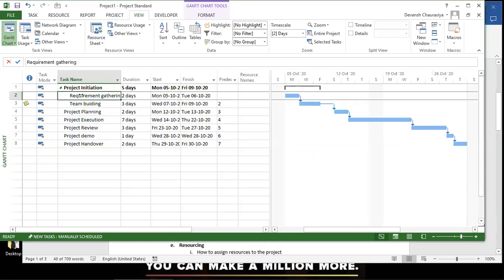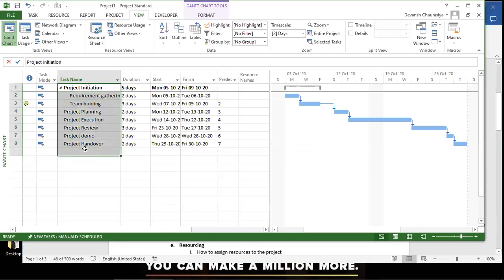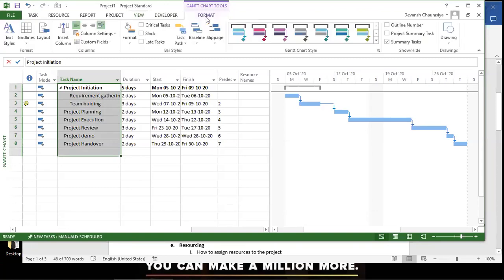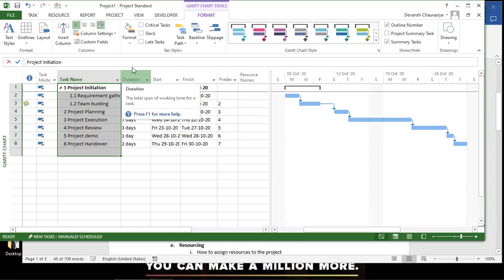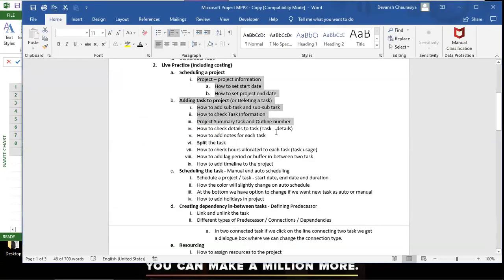With Outline Numbers enabled, instead of sequential row numbers you see hierarchical numbers — 1, 1.1, 1.2, then 2, 3, 4, 5, 6. This helps you clearly see that there are 6 main activities even though there are 8 total task rows.